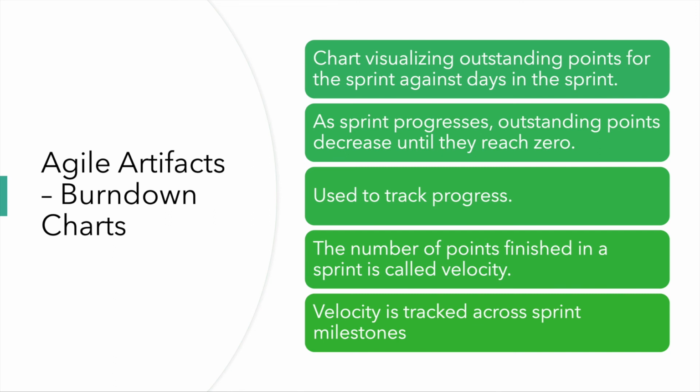That clearly indicates a pattern that the productivity is going down, or there are some problems with estimates, or there are some blocking issues or complications, or a change in requirements. That's one way the upper management will know that something is not going well, and they need to correct the path.